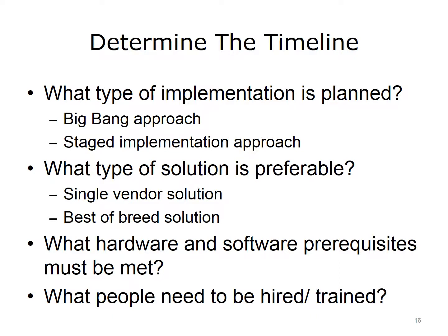The first type is known as a Big Bang implementation. With this method, all EHR functions are enabled at the onset of implementation. From that point forward, clinicians will only use the EHR when delivering healthcare services. Paper records will no longer be available. It may also involve concurrently implementing multiple modules and features of the EHR, or implementing the EHR simultaneously at multiple sites.